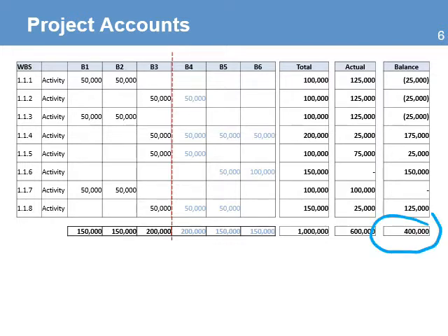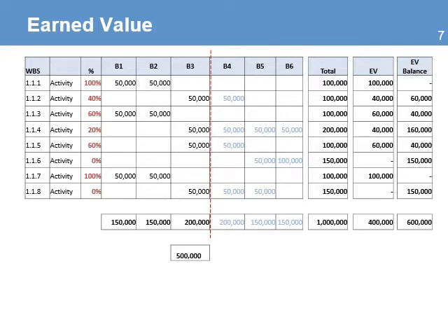From here, the information seems to show that the status of the project budget is okay, and you don't need to worry. You still have plenty of money available, but let's look at earned value and you will see a different story. In earned value, you add a column to the budget plan that shows the actual percentages of completion for each one of the activities. This is the progress reported by the team on each activity. Earned value is obtained by multiplying the total budget by the completion percentage. It is the value of what the project has delivered.